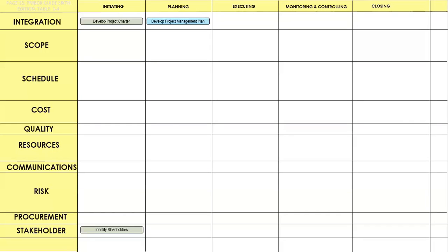Then we move into develop project management plan, where we begin to create a skeletal project management plan, but then begins to get populated with the scope management plan from plan scope management and other details along the way. We collect requirements and we come out with a requirements traceability matrix, requirements documentation. We move into defining the scope, the boundaries, the inclusions and the exclusions, and then we create a work breakdown structure, which really is in the output from Create WBS known as the scope baseline.